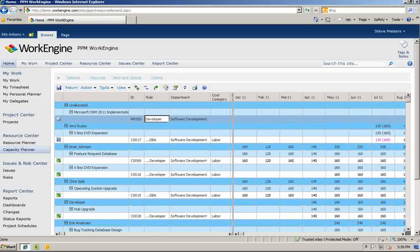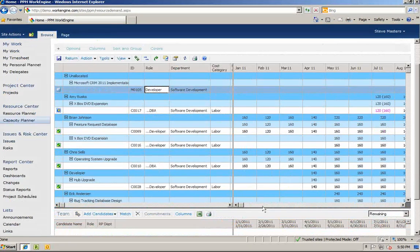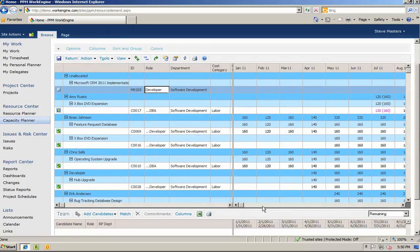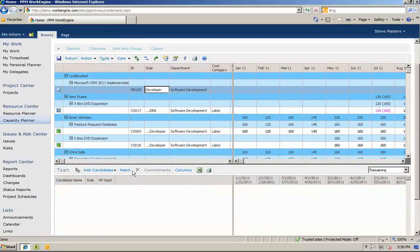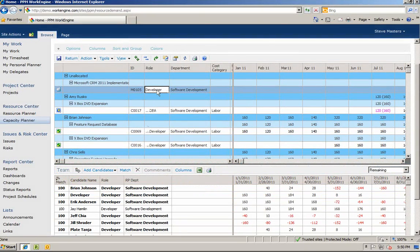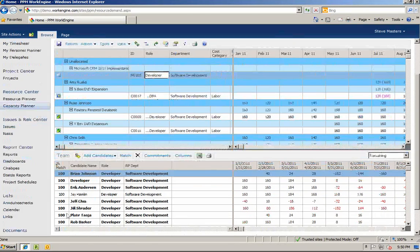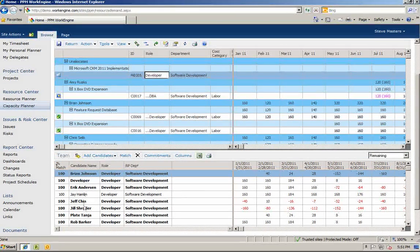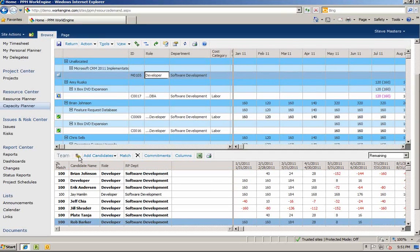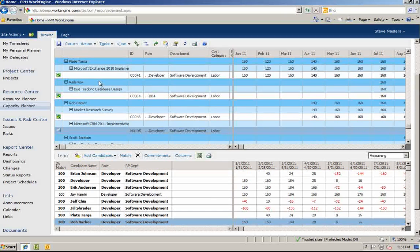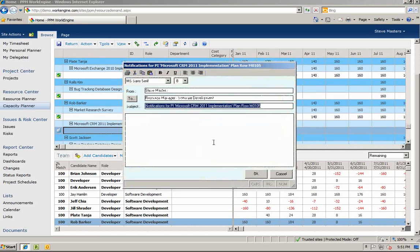From this view, you will see that you have a resource request waiting in your queue for the Microsoft CRM project. To find a resource that has the right skills and availability, you can select the request which has the requirements already listed and click the match button to find potential candidates and their match percentage. According to the candidates list, Rob Barker looks like the best resource in regards to availability and skill sets. Let's go ahead and assign Rob to this requirement for this project. We can then add a note to send back to the manager, letting them know a resource has been assigned and allowing the manager to accept or reject the assignment.